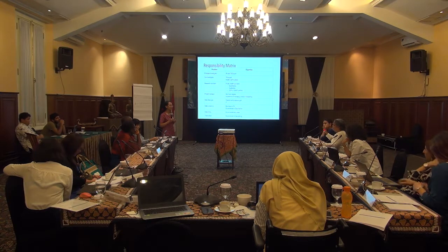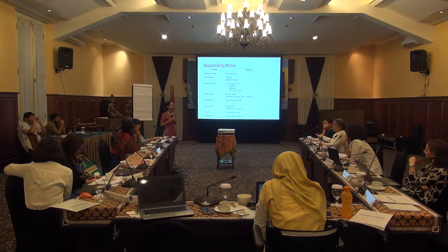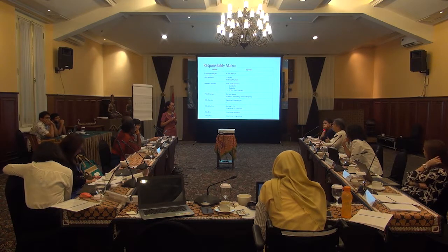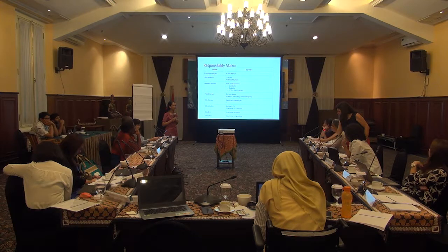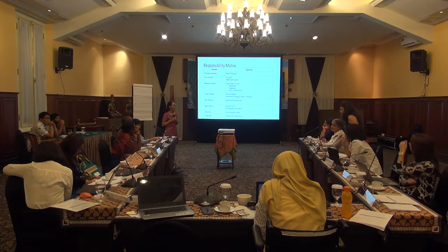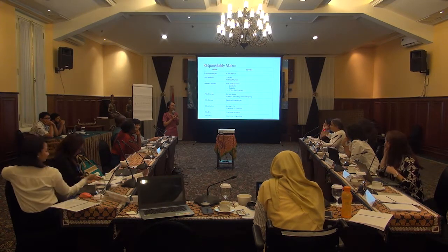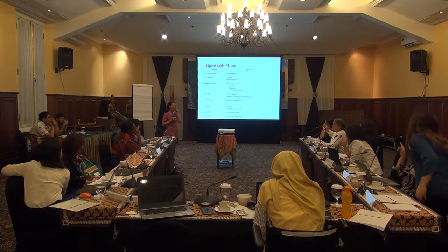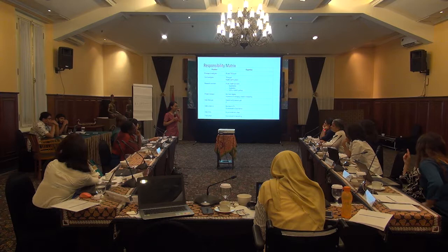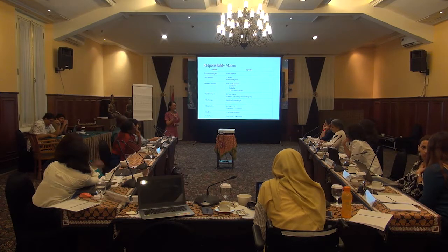I'm not even sure if your IRB is in the first instance going to say okay. Maybe they send it back to you, ask some questions, then you need to resubmit. So I think for a study of your nature, it's just impossible to get everything in place in 2 or even 4 months' time. So while you are preparing your SOPs and your forms and everything, you really need to allow some time. Right? Yeah. Thanks, Farah.